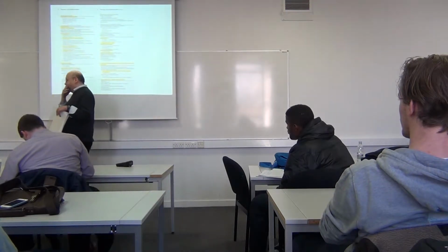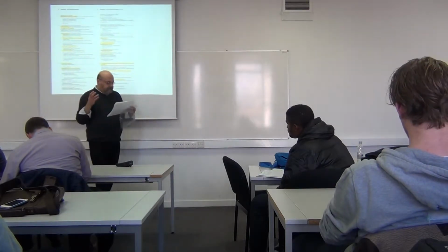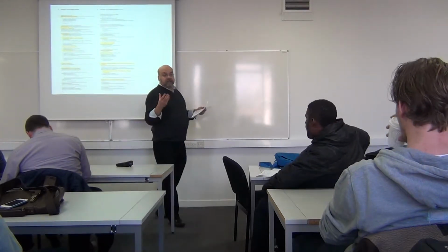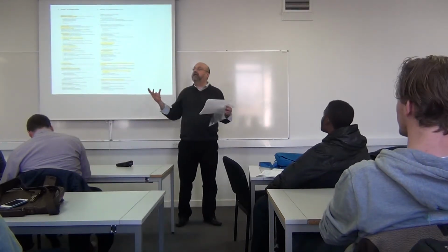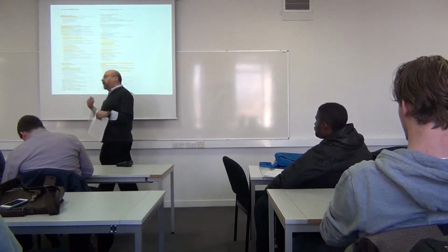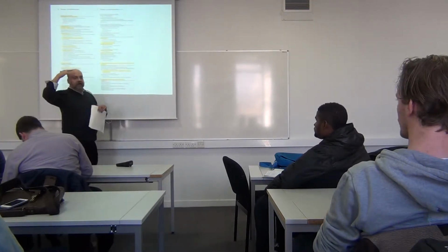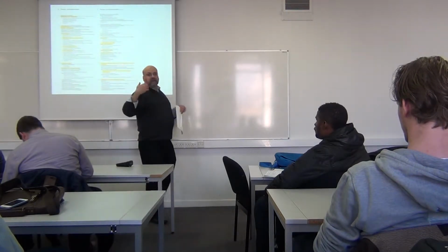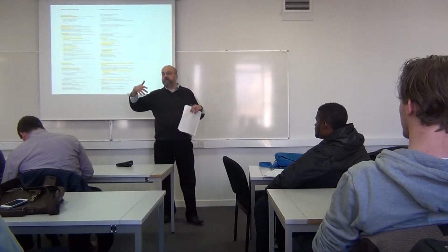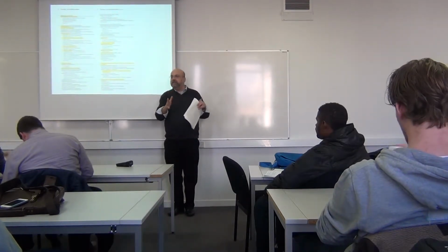For example, I have to observe or note the specialized requirements related to the building permission. There are often supplementary obligations related to the building permission, for example. I have to check that. Why? Because I don't want to be surprised when I have got the contract and then start to think about it, and then there will be more costs and more time and so on. I need to be able to calculate all this in my original bid, in my contract.